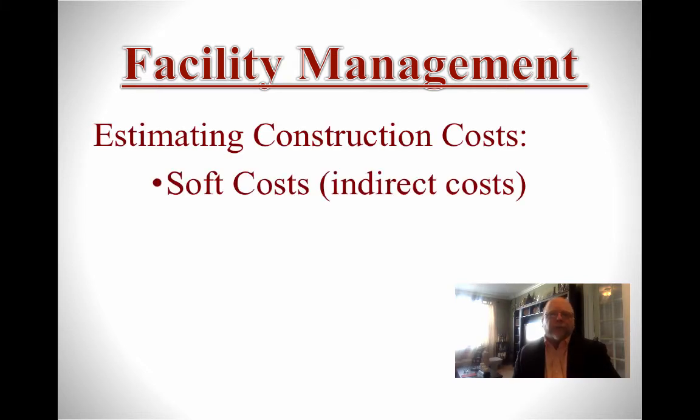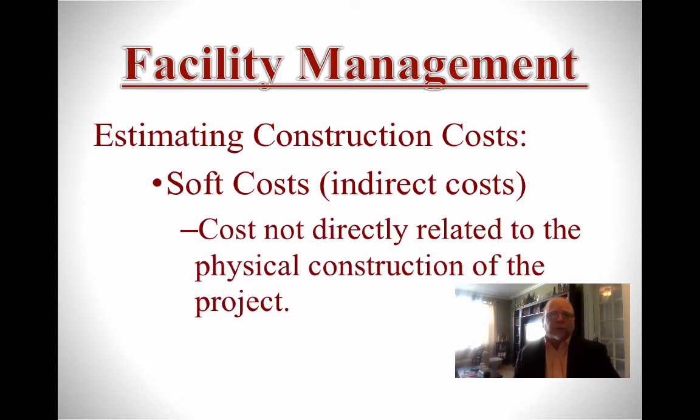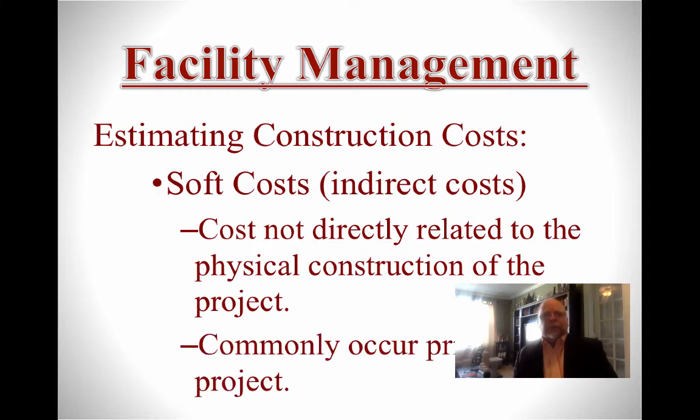In estimating construction cost, you have your soft cost or your indirect cost. These costs are not directly related to the physical construction of the project. All right, so from the beginning, you're going to have some soft cost or indirect cost. These are costs not directly related to the physical construction of the project. All right, they occur prior to the project beginning.